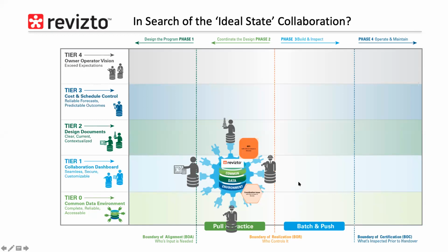Yeah, absolutely. And it gives us huge dashboards, which is hopefully what we'll look at, where we can start to see some trends comparing coordination issues to RFIs, because that's where you'll get a leading indicator. If we identify that RFIs are necessary, they're not necessarily bad as long as they're not happening when we're out in construction, but we'd rather have many more coordination issues that get resolved and reduce the number of RFIs. So how could we measure the difference between those? I know you were showing that, Mark.